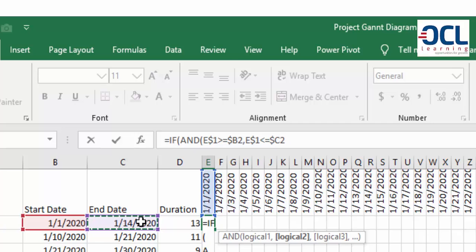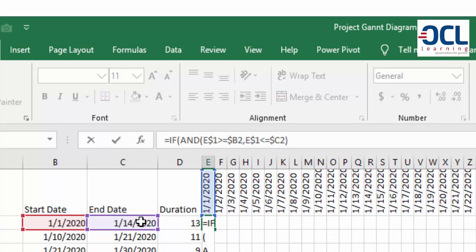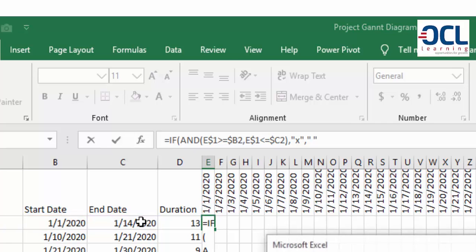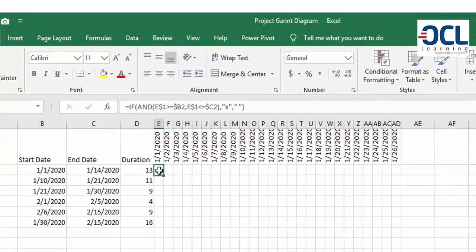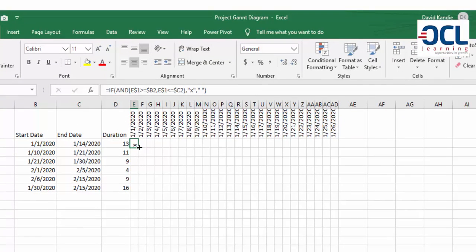If those two conditions are met then I will say return the value X, otherwise value if false return a blank and I press enter. So it will return X here.